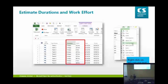There are different approaches, right? Some people use a deliverables-based work breakdown structure, whereby you just say what needs to be completed. If there are 5 of those milestones or deliverables, I'd make each a milestone in the project, and then I would specify what needs to be done to complete each of those things. So it doesn't matter how you put it in there. You just type it in. You can put in phases, and you can put milestones using summary tasks and milestones, and you can do it that way as well.